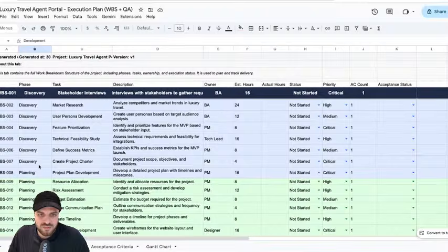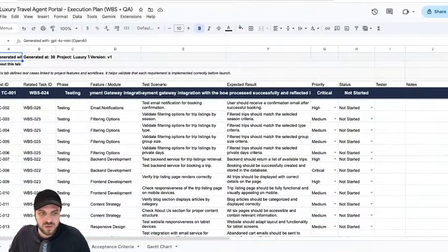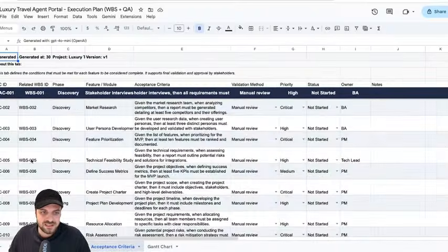You want to have each of those tasks clearly aligned, so you can then as well create QA test cases. Do it from the beginning. For every task that you're about to develop, for every cool feature, define the tests that you need to have. Define the acceptance criteria so that the client says, okay, if that specific functionality works, then we will consider this feature as accepted.